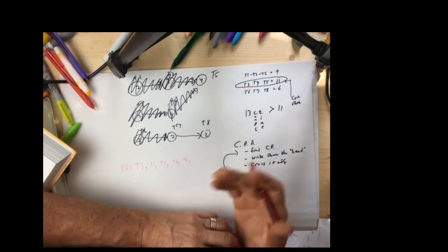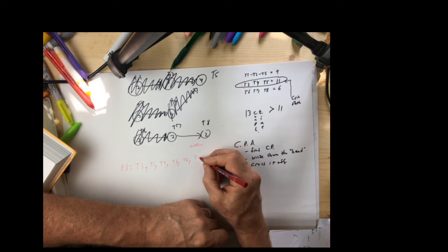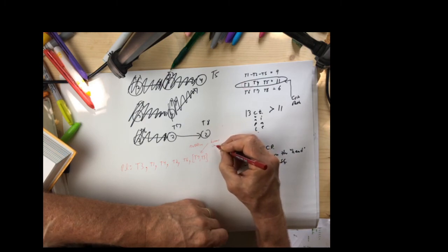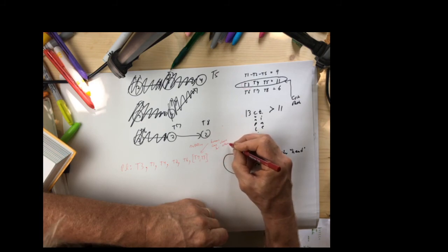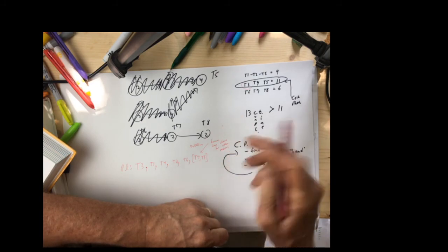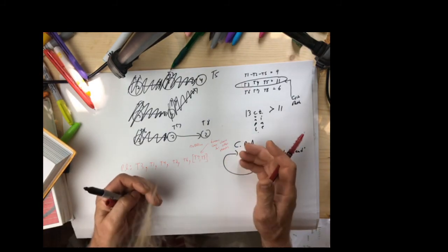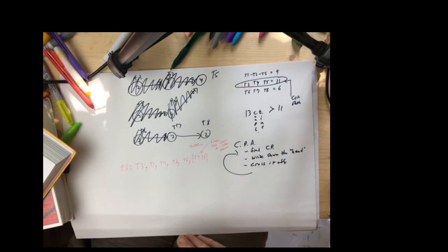Since they're tied, I can write either down or both. We have a notation. We can do it this way. We can write T7, comma T5, and we can put brackets around it, which says humans can choose for other reasons why you might pick one over the other. We call these ancillary or auxiliary concerns. The math argument doesn't care which one of you put in. Either order is fine, but humans might have a reason.